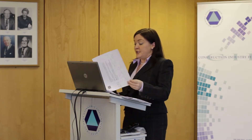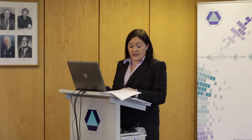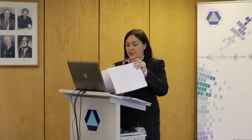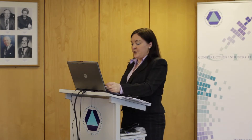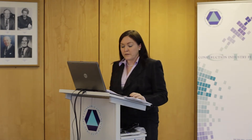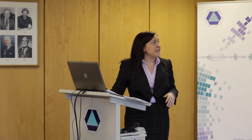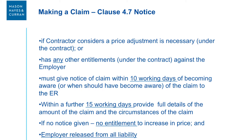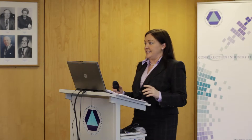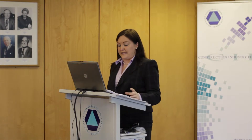If you're requested by the EUR for a quotation, make sure you give your quotation and make sure you give the quotation that works for you. In terms of making your claim, clause 4.7 is the critical clause - that's on page 6 of your contract. That's the equivalent of clause 10.3 under the standard contract, which everyone refers to as 10.3 notices. They're not - they're 4.7 notices under this contract.